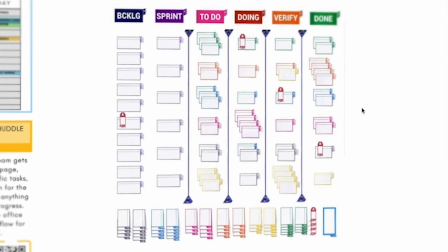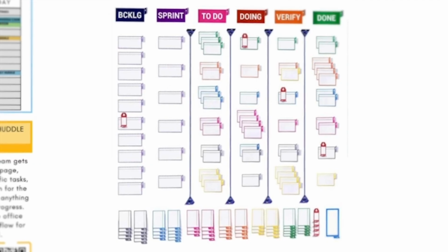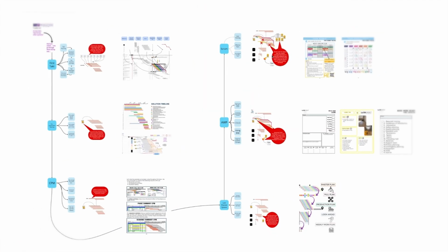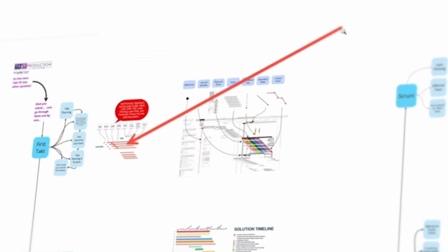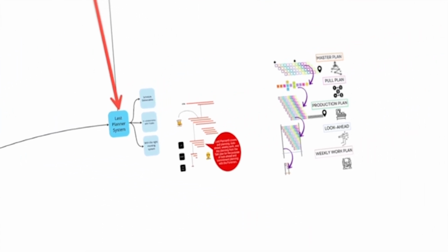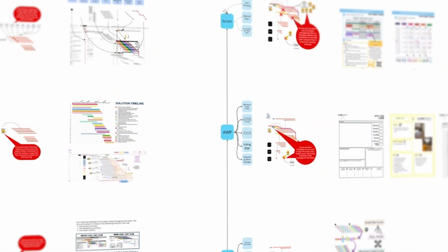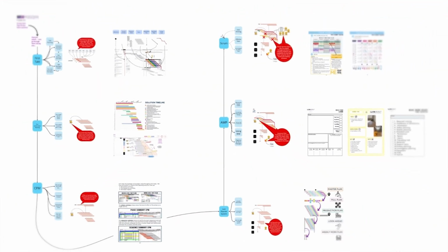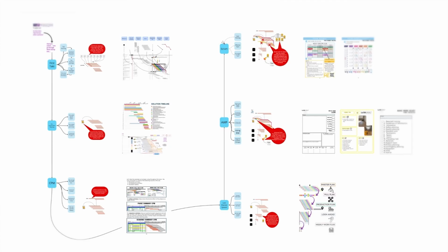And what I want to do is make the case here that all of these systems can tie together. So when you're looking at, let's say Takt, that's your base. Pre-con planning, that's when you actually plan your base. CPM, it should be used as a summary. Last planner, it's how we get it to the trade partners. Advanced work packaging, this is how you package work for the install. Scrum, this is how you solve problems. So they're not all separate systems that are like some other technology. They all work together as a part of lean project delivery.